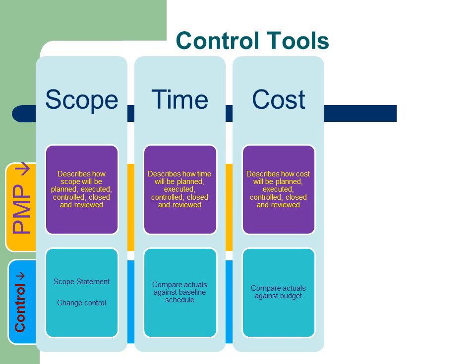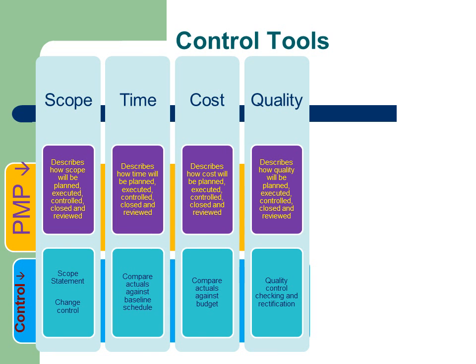Cost control. The PMP describes how expenditure will be recorded and compared against the budget. The predicted expenditure in the budget must be compared against the actual and forecast expenditure. Quality control. The PMP describes what quality assurance processes will be incorporated into the project in order to produce high quality deliverables.